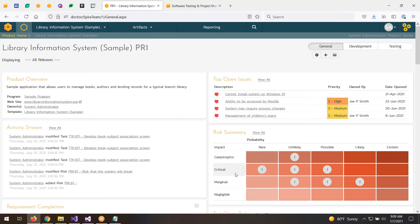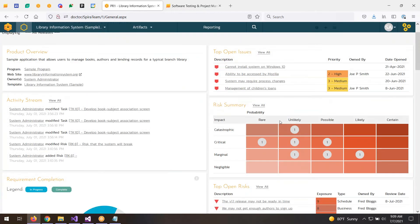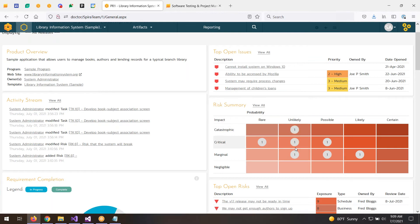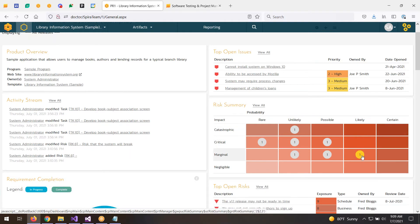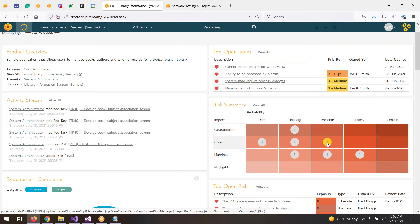I can see the risk impacts — catastrophic, critical, marginal, and negligible — and these are customizable. I can also see the probability, how likely it is. We plot on the x and y axis the number of risks in each category. The worst risks would be those that are certain and catastrophic — luckily there are none. The ones that are most likely and marginal are a problem, but this one here is quite a problem because it's possible but critical. Let me look at that one.